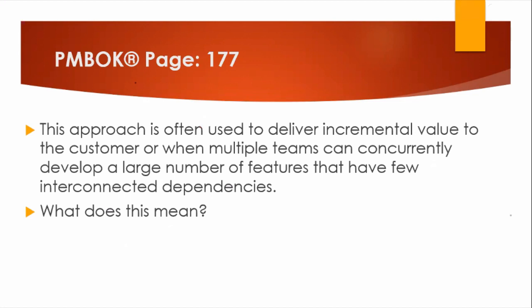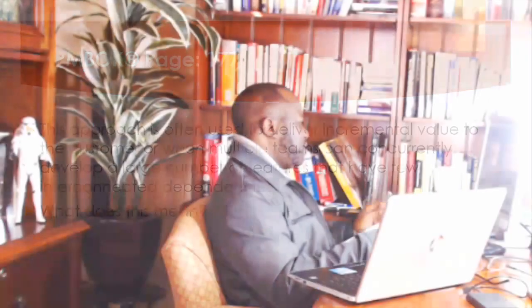The way scheduling takes place on many projects, especially in the IT realm, is changing. So things are not like they were before. You know, in the traditional way of scheduling, it would be A, then B, or they're all linked. In this regard, it is the team that decides what to do and when. And apart from that, a lot of what the team is doing, though it will add to the final deliverable, for those features to get into the final deliverable, they don't necessarily need to be done in a particular order.